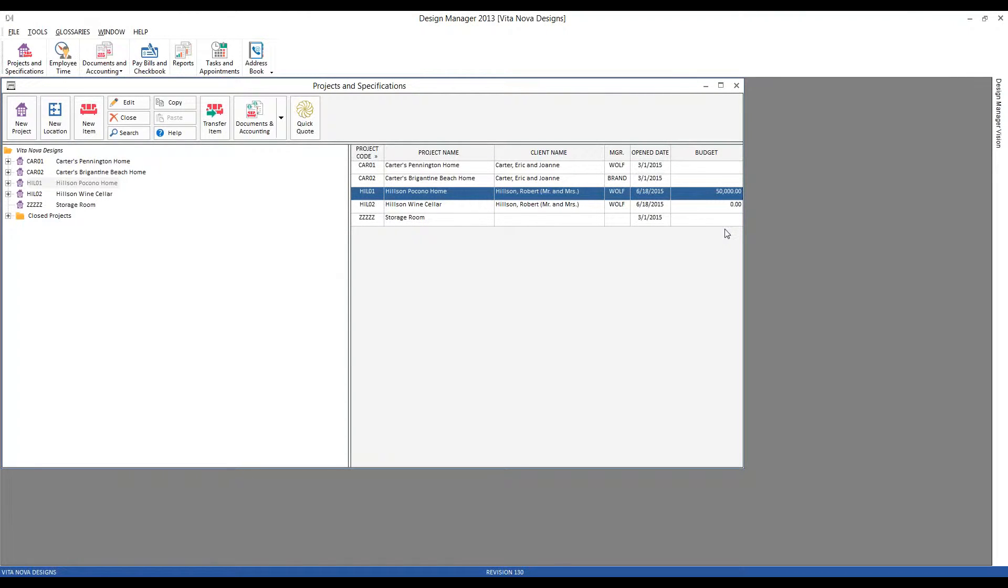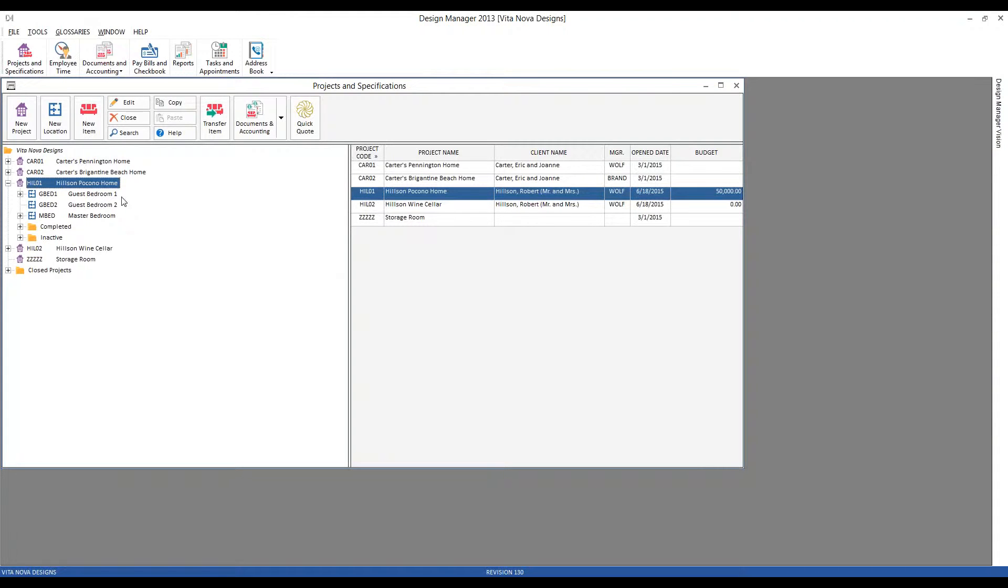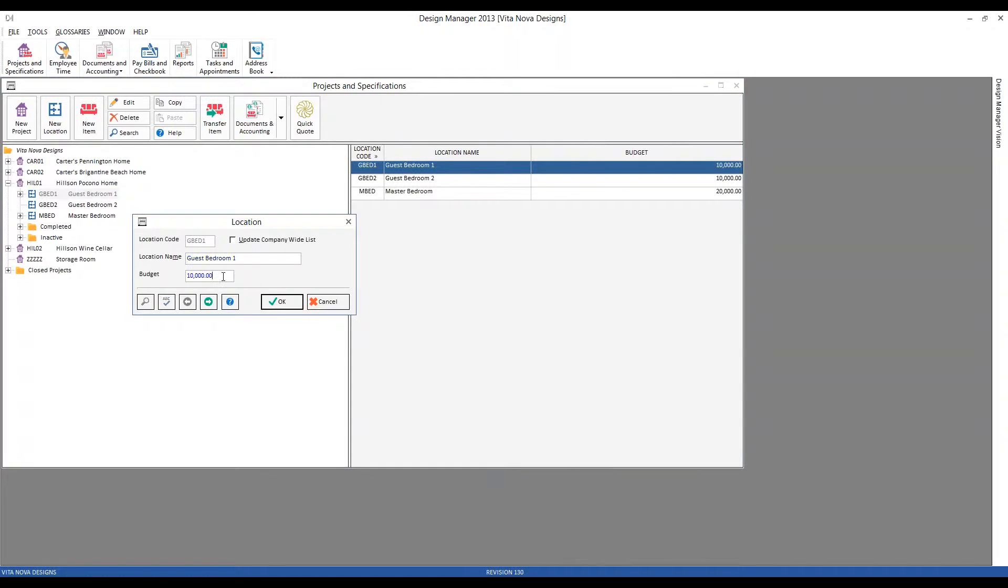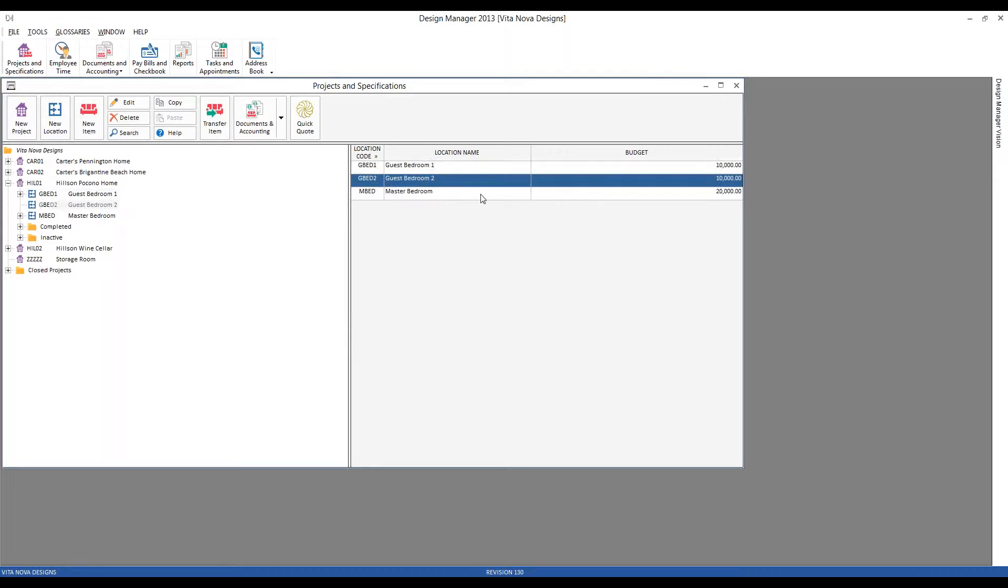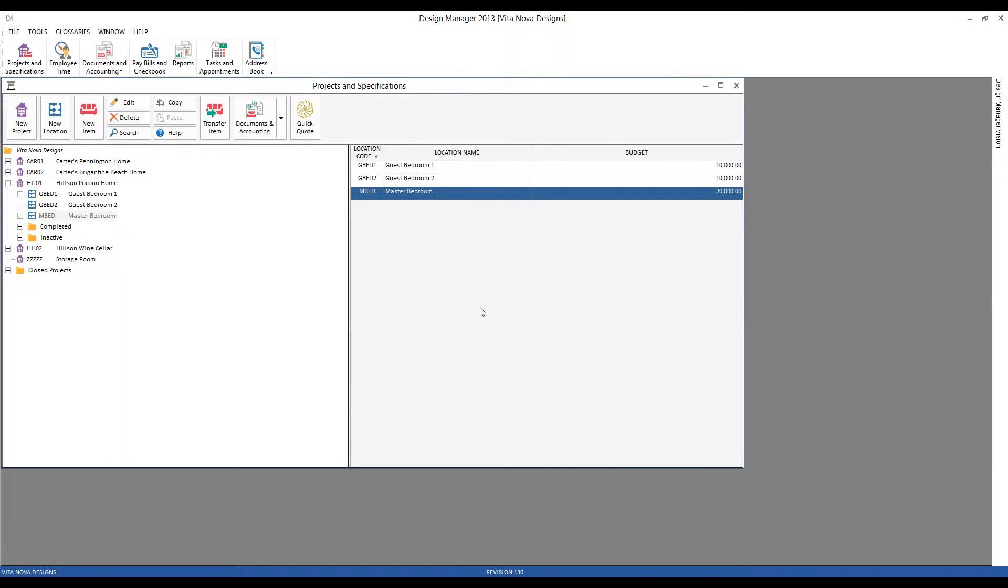Within a particular project, however, the budget amount can also be set for each location within the project, as we begin to allocate the total budget for the different areas of the home. I've already gone ahead and set budgets for our guest bedrooms and the master bedroom. So we can see on our guest bedroom one, I've input a budget of $1,000. And you can see the budgets for the guest bedroom two and master bedroom, again, with the budget column on the right-hand side of the spec grid.